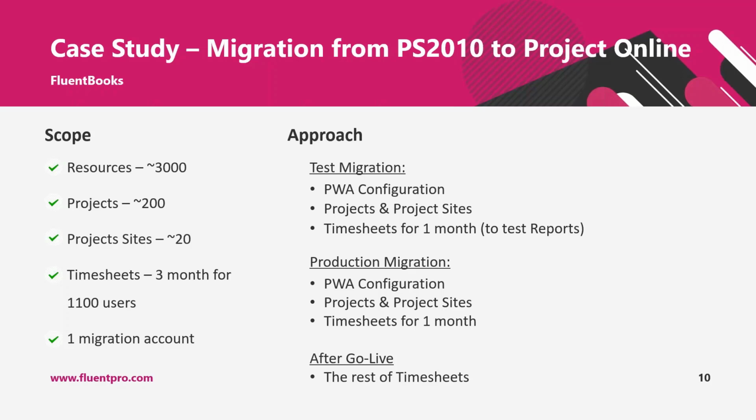We highly recommend to spend some time to create this mapping accurately and verify it several times, because on the accuracy of resources migration also depends the data integrity of projects. If some of the resources are mapped incorrectly, these resources will end up as incorrect assignments in projects, and this can affect project schedule and project finances. So this is a really important exercise that requires thorough attention and some time.